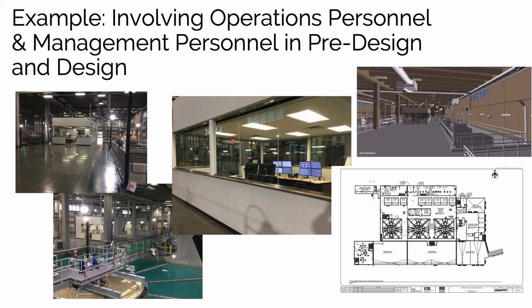So they created a 3D design model, and that's this picture up in the upper right here. With that 3D model, the operators could virtually operate the plant. They had little characters that each of the operators could move around the plant, to see how it was to get from one place to another, where assets were located, how they worked, that type of thing.